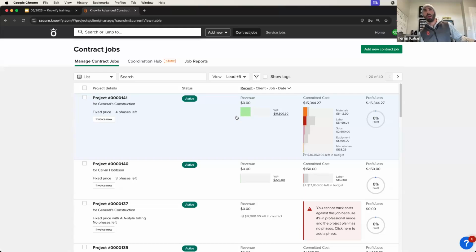Mostly because overhead is by definition not job specific, right? It's something that doesn't go to the job. So we're now talking about trying to divvy up how much overhead goes to which job, which can be a little bit abstract. There's a percentage base of how much time one job takes versus the other on administrative time. So in general, we shouldn't be trying to track overhead as job cost, because it goes outside of the concept of job costing and focuses more on company-wide reporting. How much did I totally spend beyond just jobs, everything I spend as a company in this year?